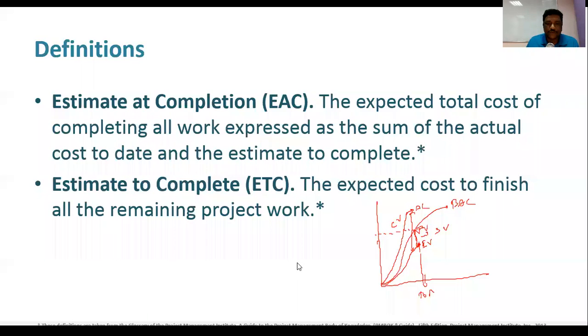Again, please, why do we calculate SPI and what does the number 0.833 mean? Okay, Ahmed, SPI is used for 2 purposes. One, to figure out whether you are ahead of schedule or behind schedule. When the value is less than 1, we are behind the schedule. And also, SPI is used for forecasting purposes, which I'm going to do now, so you'll understand the reason behind having an SPI. All right, fair enough. Let's move on to forecasting.